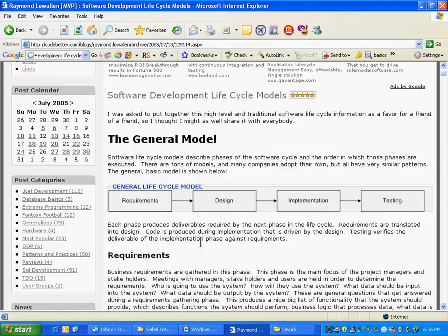See, basically the way software is developed is first the project manager will plan that, okay, I need to hire 2 BAs, I need to hire 3 BAs, or I need to hire 2 developers, and I need to hire 1 tester, and so on and so forth. He has a very high level idea what he's going to make, but he still does not know what he's going to make. Then he hires, first thing he does is hires BAs, and the BAs come in and they gather requirements. And then they talk with users, they talk with the target users. So usually the requirement gathering process will go for like a month and a half.